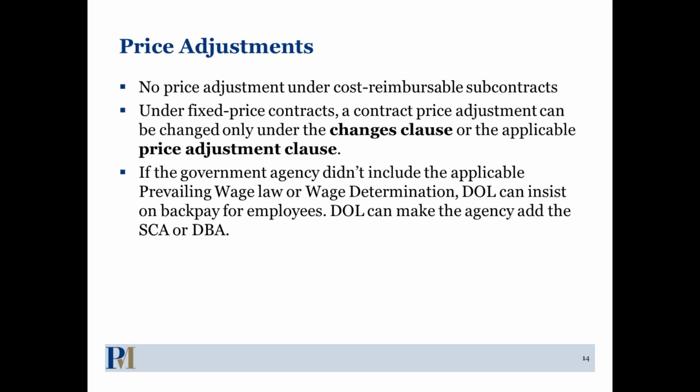Generally, you'll note, if you looked closely at the last two slides, that there was nothing that said cost reimbursable contracts. And that's because there is generally no price adjustment clause for cost reimbursable contracts, because the idea is that you would get your costs reimbursed, and there's a method to do that.